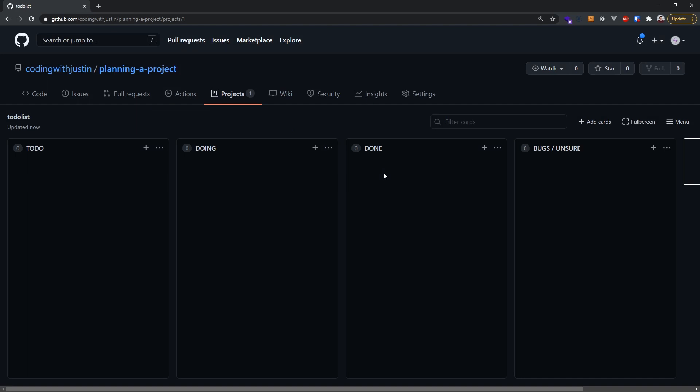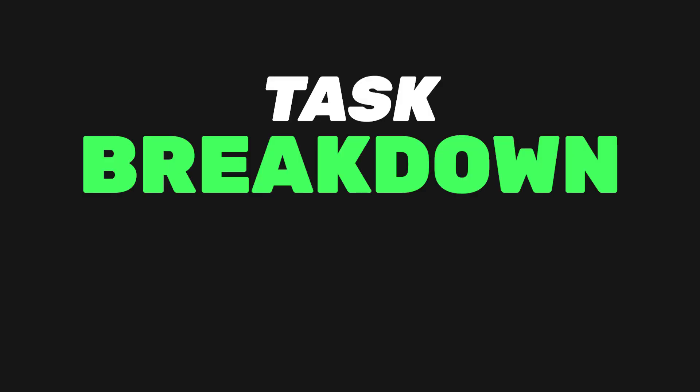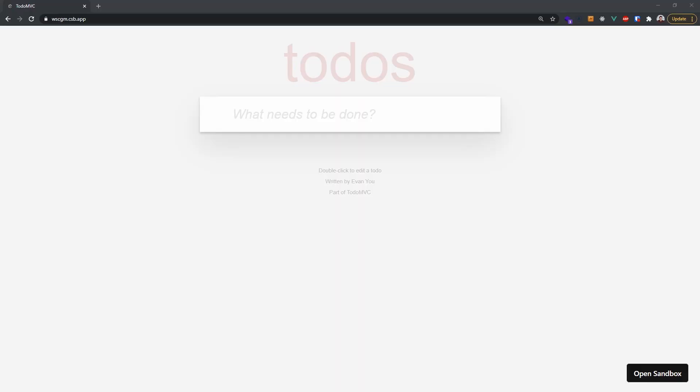Now we have our workflow set up and we can get on to the last step. The key to building your own project is by breaking it down into smaller and less intimidating components. These smaller components are what becomes our card in To Do.